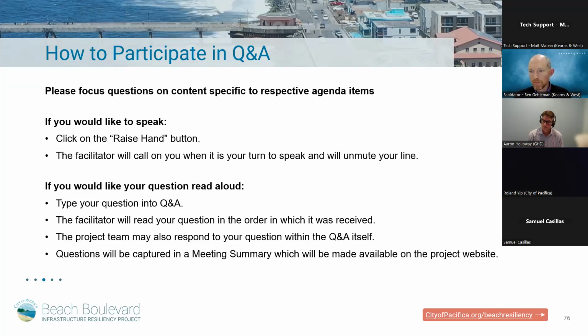So I believe we've looked at the cost, and I just want to clarify on the cost of 80 million, because I think we've shared some additional numbers for the additional sand nourishment and O&M, operation and maintenance, in the future there. So in terms of the cost, I think we've shared numbers for 100+ million that includes operation and maintenance with a cost of no project cost. So those two numbers have been shared in previous meetings in phase 1, and I believe the no project cost is higher by a decent number here.